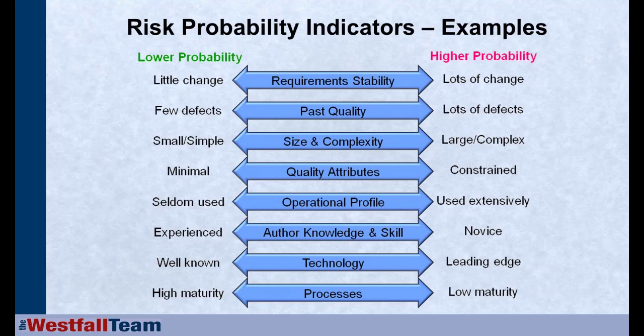This might be where it would be ideal, based on risk, to pull exploratory testing out of your tool belt. I like to always reserve 10 to 20% of my test time at a minimum, just in case I'm finding things in a component I did not expect to find things in, so I can pull exploratory testing out and look at that error-prone component in even more detail.